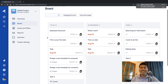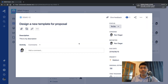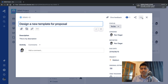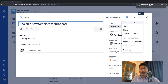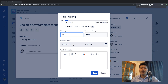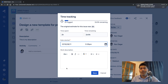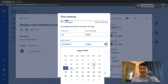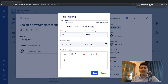Now I want to start logging work. If I click on a particular issue — say 'Design a new template' — I can log work as the assignee or reporter. Click the three-dot actions menu at the top of the issue, select 'Log Work', and you can specify that you worked on this issue for two hours. You can also change the date — for example, log it for last Friday.